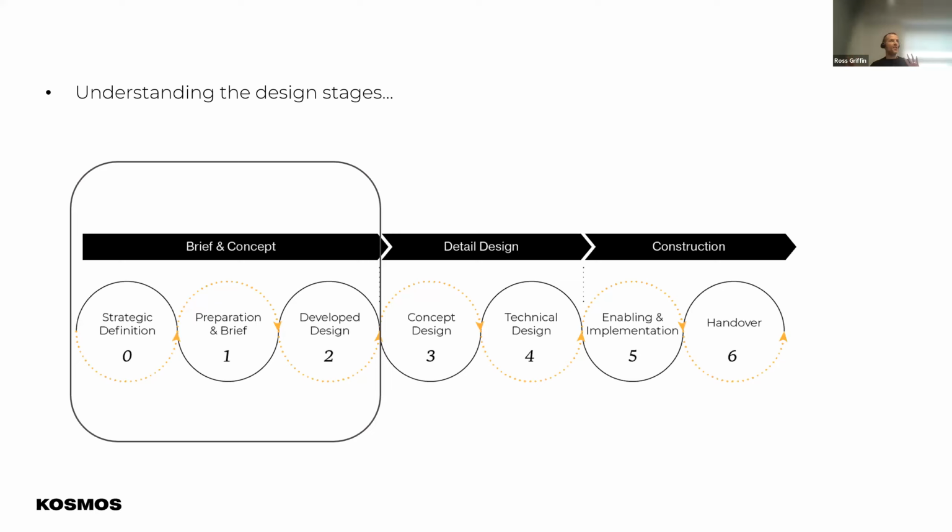And so when you move to stage 2, structure becomes layered in, and suddenly what you're getting for architecture is like a 200, 300 for the structure. You're beginning to get your 200 for the mechanical and electrical. You're beginning to get main distribution at a kind of 200 level, just on placement and location.